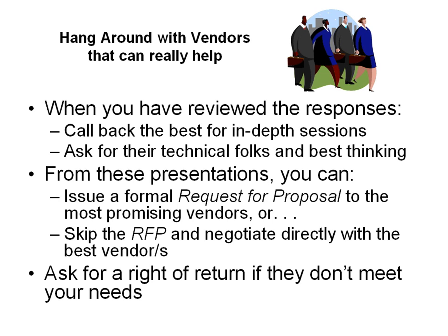But if you put out an RFI and you've been very detailed about that, you can ask for a right of return, and then after they yell and scream and you yell and scream a little bit, you may get at least a partial right of return if what they are going to sell you doesn't meet your needs. It's worth doing it, if only to let them know that you're not going to go away easily if they really have sold you something that's not for what you really need.